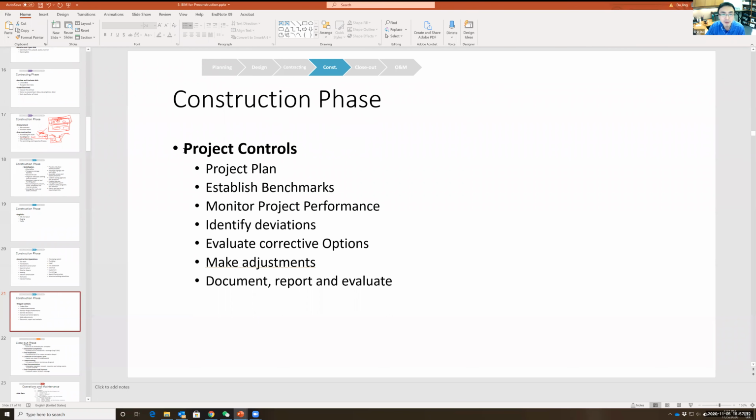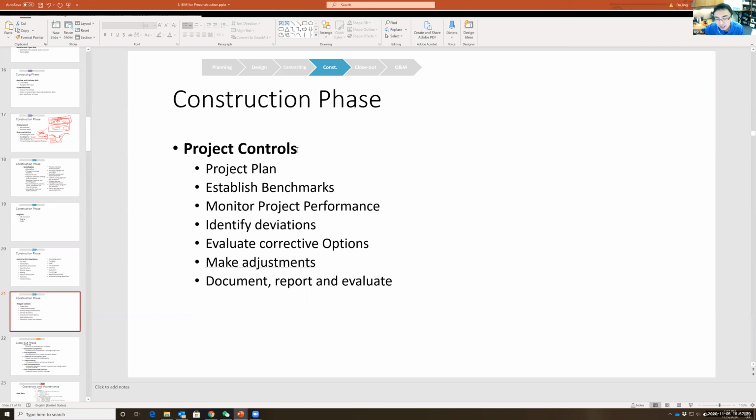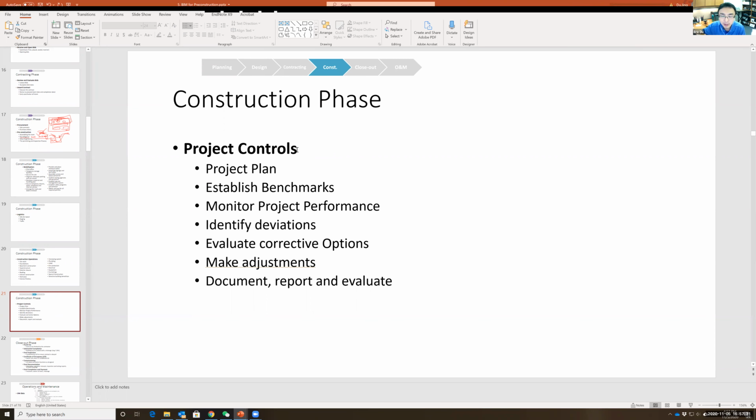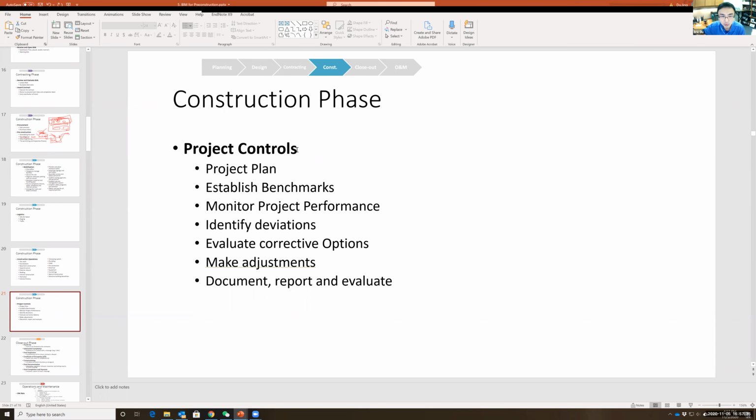And we also have a very important function for construction phases of project controls. So we have a team. You guys, play the game yourself. So it's basically they collect the earned value on a weekly basis. Usually it's every Monday. They collect what they have done last week, and the number of people, number of hours they used the last week, how much materials they used the last week. They report that into some system, and they calculate their cost and their achievement.